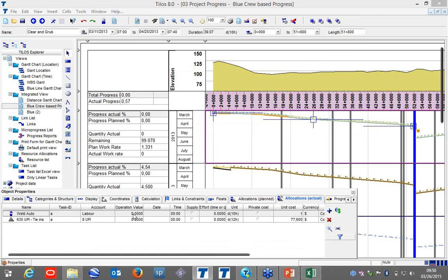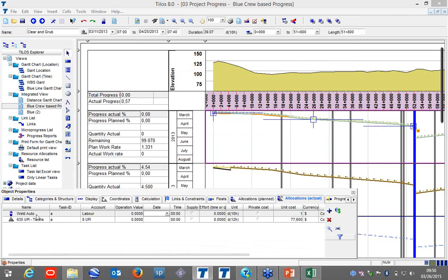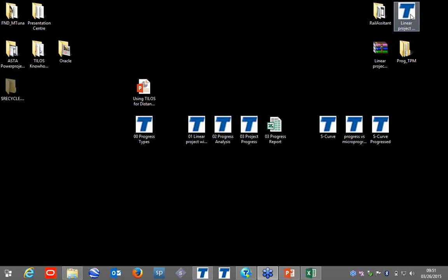and here we have the option to put the dates, and it is just a point. It is giving you a point and how many of this machine you use in the system, and you need to put, for example, used it is 2, and you can get this effort calculation and so on, with the date. So this can be displayed on the histograms, and we can analyze these things on the histogram.